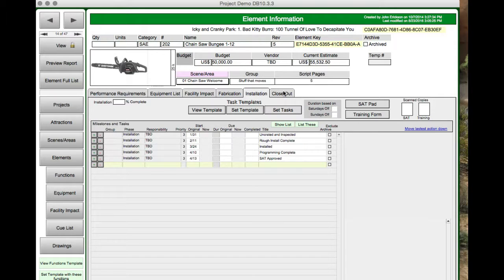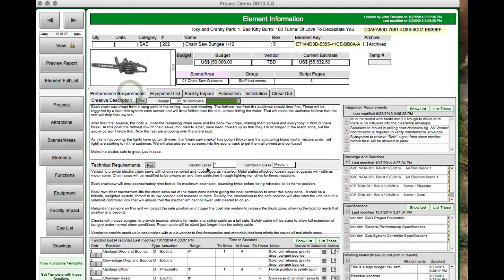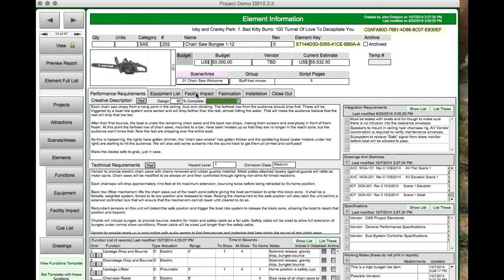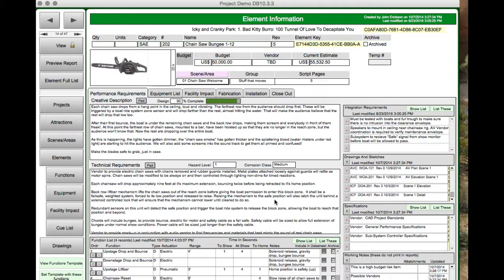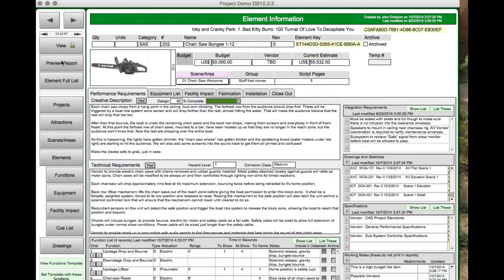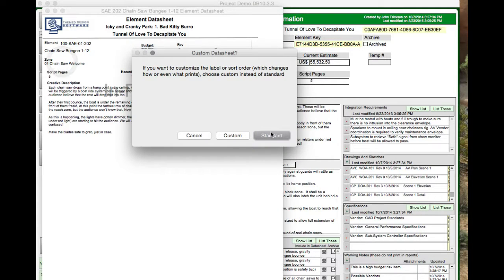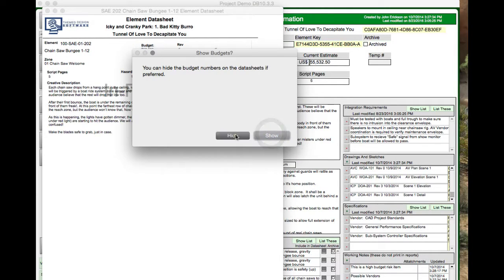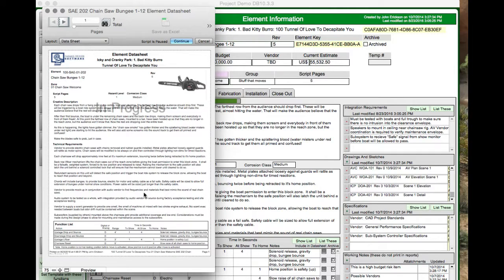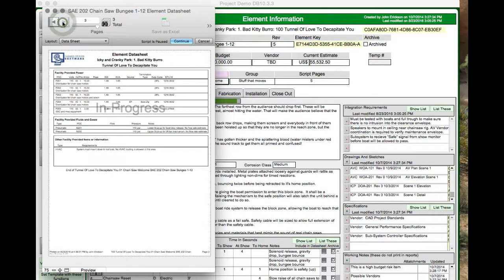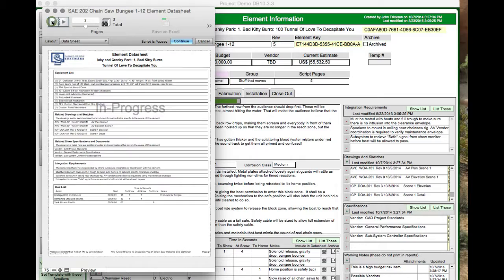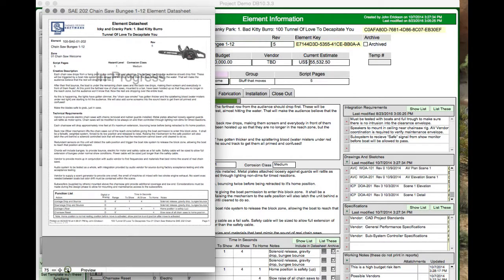A lot of this information, obviously not the closeout, installation, fabrication, but the rest of this shows up on an element data sheet that you can use in your scope of works. The facility impact, you don't necessarily have to put that in there. There's ways to put it in the table or take it out without deleting the information. But it's good to put it in there even in your scope of works, because if you've already given a preliminary list to the general contractor, it's good to let the vendor know what that list was, what your assumptions were, and they can correct it from there. If we take a look at what this report actually looks like, we use a standard report. I'll hide the budget data. I'm going to expand this out. I do it in a small size because usually when you're reviewing this, you already know what's in there, you're not reading the data, you're just looking for the formatting and making sure that looks okay.